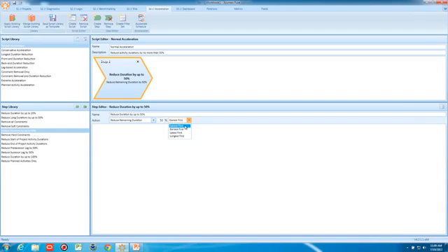Well, it knows where to start because we've told it to start with the easiest activities first. Now, the easiest activities to gain time back in your project are the activities on the critical path. If a critical path activity is reduced by 1 day, your project finish date may reduce by 1 day. Now, if there's secondary critical paths that are very near the primary critical path, you'll get diminishing returns.